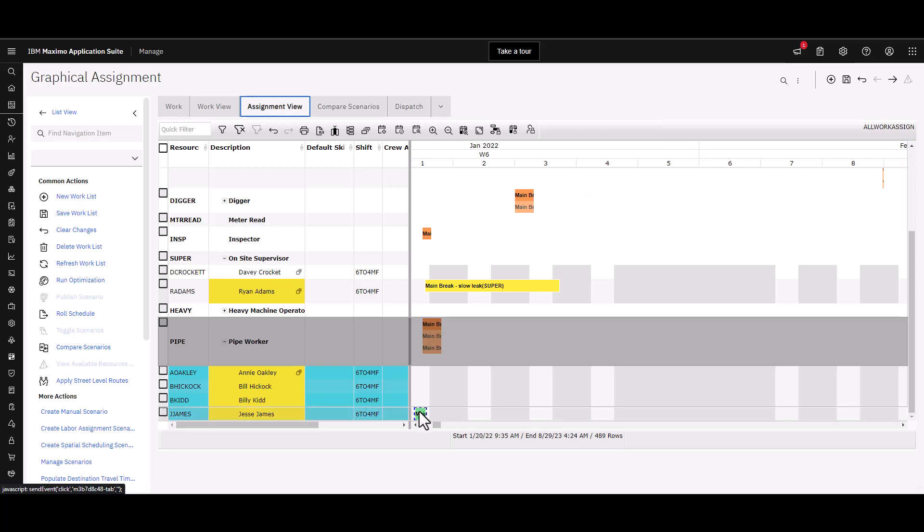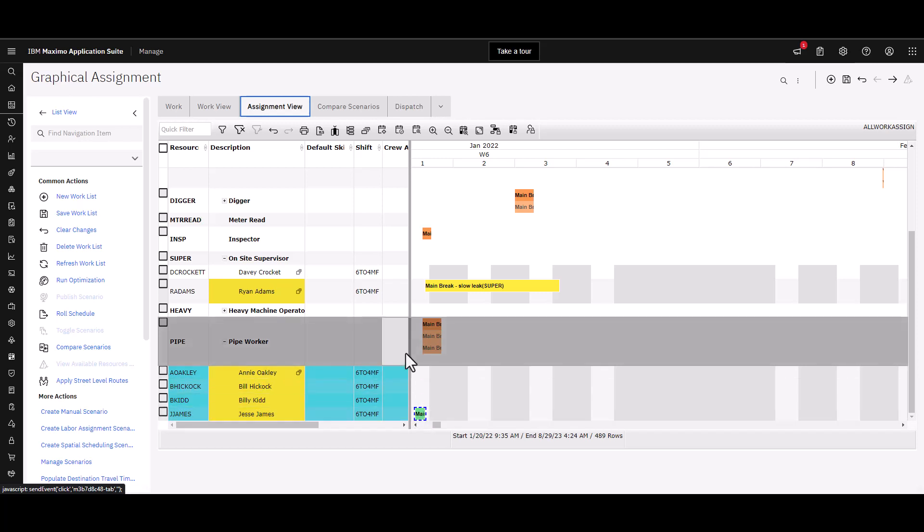Between the work view and the assignment view, you're able to see what assignments need to be done, make those assignments, and then you're able to see the current assignments as well. Any changes that I make, I'm going to have to come over here to the far right and click save to actually save this work list. Then behind the scenes, the work orders get updated as well.